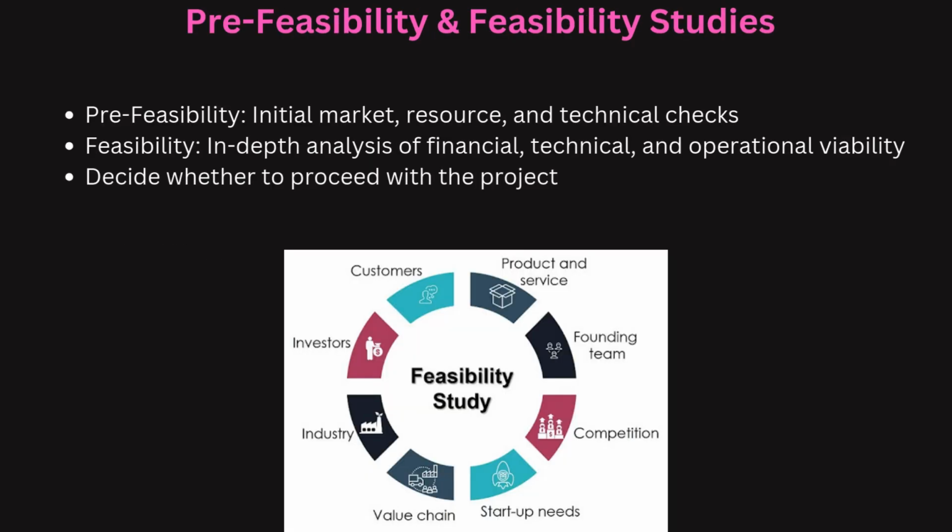So at first, the pre-feasibility and the feasibility studies. Pre-feasibility studies are the preliminary analysis conducted to determine if a project is worth further investigation or not. So these studies focus on key factors like market potential, resource availability and technical viability. The goal is to rule out the non-feasible projects early on, saving time and resources. Once a project passes this stage, a more detailed feasibility study is conducted. This study evaluates all aspects including the financial cost, projected revenue, technical requirements and market conditions. The feasibility study ensures that the project is both viable and profitable before any significant investment is made.